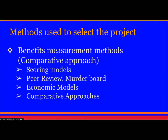The method used to select a project is the benefit measurement method, which takes a comparative approach. Under this comes the scoring model, where weights are assigned to each factor identified by the PM, the total weighted score is calculated for each project, and whichever project scores the highest gets selected.